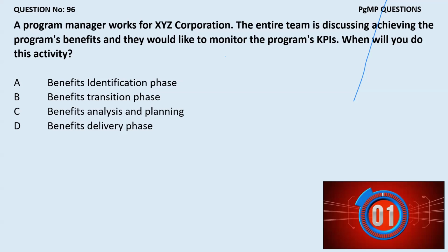This is a typical wording question. When will you do this activity? I'm talking about when will you monitor the program KPIs. So I'm not developing the program KPIs. I am monitoring the KPIs. I will only monitor the KPIs when you are doing something.